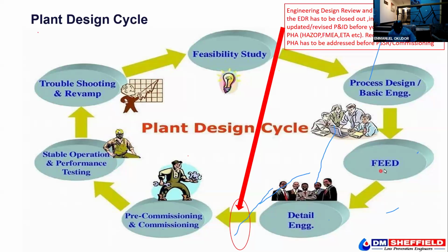At this point, you do hazard. Some also do engineering design review, but here it is still young and fresh, because there are so many changes between FEED and the detail engineering design. So it is when you do your detail engineering design here that you do your engineering design review here.